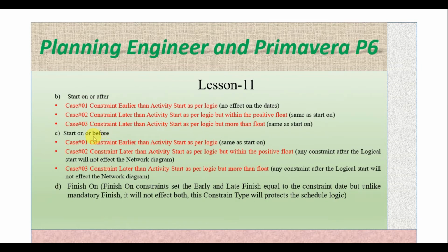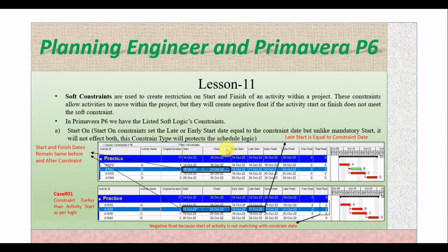Start on or before. Case 1, constraint earlier than the activity start. This is the case 1. So same as start on here. So case 1 of start on, the start and finish date will remain the same, and it will create a negative float in the logic.